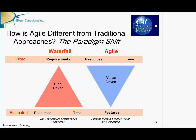Now, how is Agile different from traditional? I love this picture — when I first was learning about Agile, this is what really drove it home for me. The source is DSDM, one of the Agile practices. What they say is essentially all we've done is flipped this triangle. In waterfall or traditional approaches, all requirements are defined at the beginning of the project and then locked in or fixed. We then use that defined scope to estimate the resources we'll need and the amount of time it's going to take. We end up with a plan-driven project where we always have to guard against scope creep or changing requirements, because they might throw off our resource and time estimate.